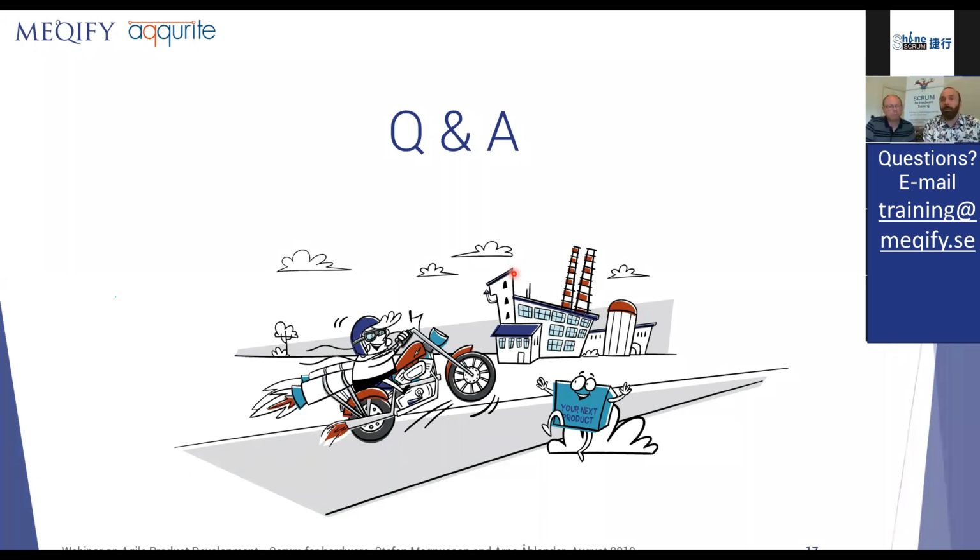I can do an example. My PCB supplier said it took 4 weeks to manufacture a populated PCB board. And I asked them why. Well, we have this and this and this and this, okay? What if I take responsibility for the quality control and you don't do it? And you build it, ship it, and if it doesn't work, I'm fine with that, as long as we learn something from it. So I promise that I will not sue you or go with my lawyers in the contract and say, well, you didn't build what we expected, but instead you promise me that you do it as fast as possible. So after half a year of work with this PCB manufacturer, we were down to 3 days.